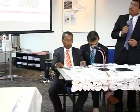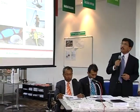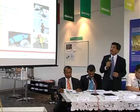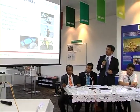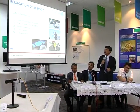On utility disruption, there might be some potential disruption to the public on services due to public services and utilities. For example, temporary shutdown of TNB and JVA water pipeline for jointing and relocation purposes. So the affected utilities that need to be relocated are telecommunication cables, TNB cables, 11 kV and 33 kV, water pipeline, street lighting, and gas pipeline.